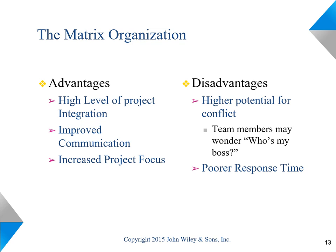What are the advantages and disadvantages of the matrix organization? The advantages include a high level of integration of various functions, improved communication, and improved project focus. The disadvantages include higher potential for conflict because of having two bosses — your functional boss and the project manager — and poor response time because more bosses typically get involved in responding to any questions.